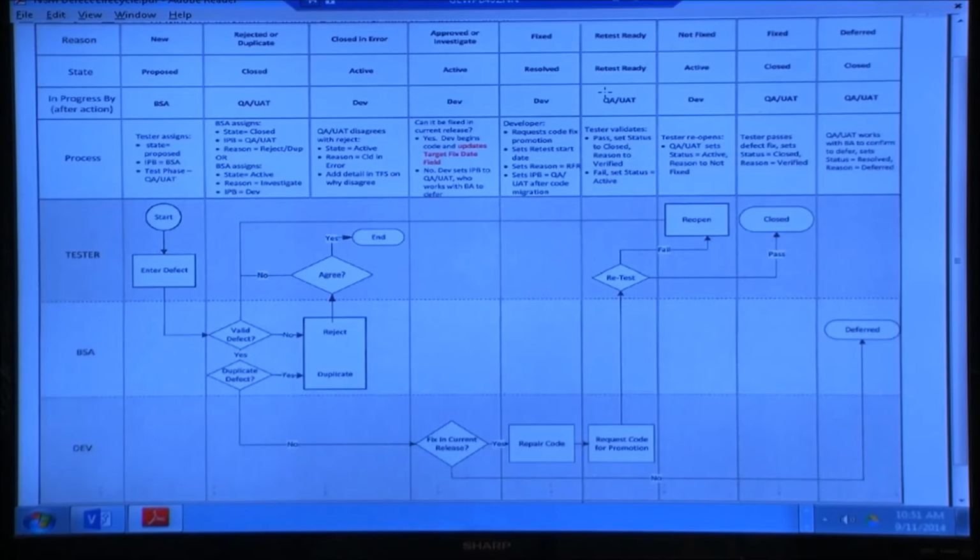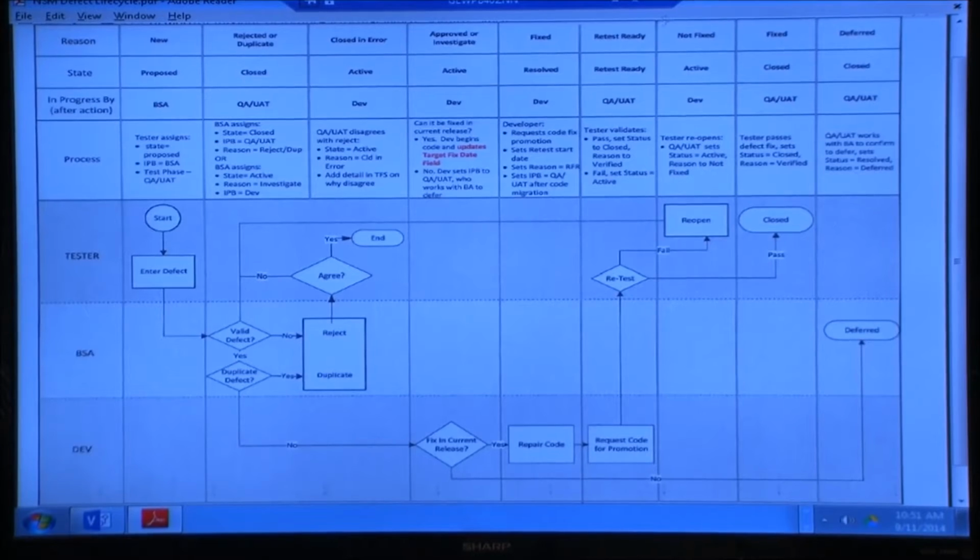If you missed the name, you can see the states and who did it. We'll look at that in a second. And then the happy path for the bug: if it's closed, whoever opened it is going to go ahead and close the bug. If they think it's not fixed yet, they're going to set it back to active and get it reassigned back to your triage group.